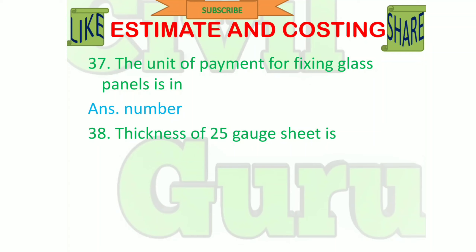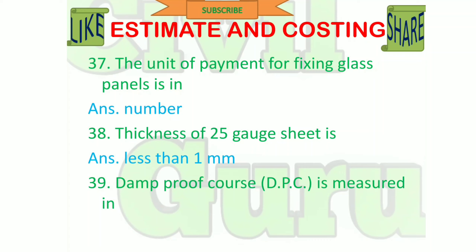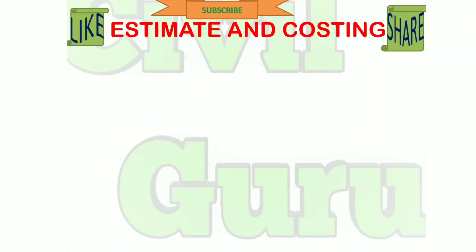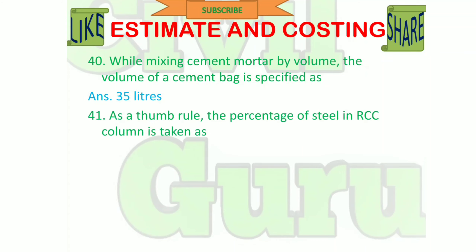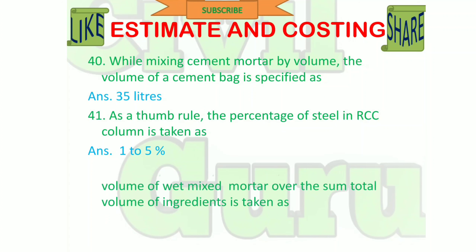The unit of measurement for fixing glass panels is in number. Thickness of 25 gauge sheet is less than 1 mm. Damp proof course is measured in square meters. While mixing cement mortar by volume, the volume of a cement bag is specified as 35 liters. As a thumb rule, the percentage of steel in an RCC column is taken as 1 to 5%. For analysis of rates, the reduction in volume of wet mixed mortar over the sum total volume of ingredients is taken as 25%.